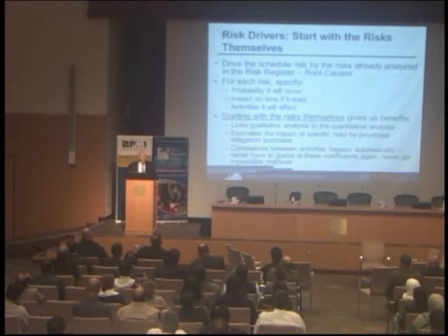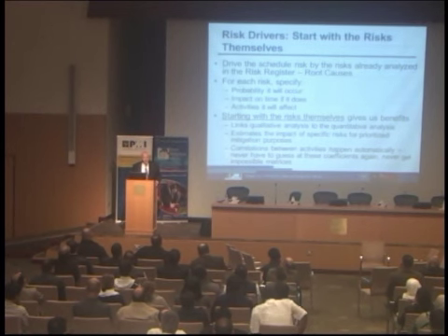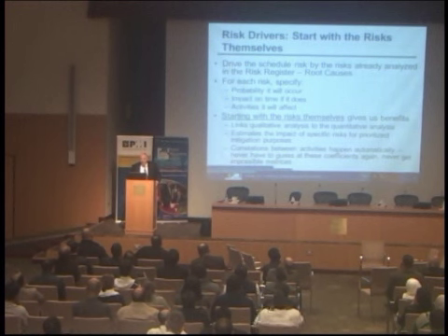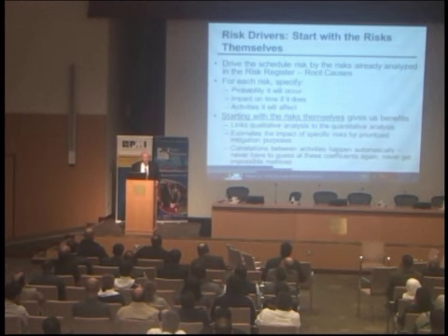In other words, we think that most likely we have overestimated labor productivity in the schedule. And most likely it's going to be 10%. The activities that it's assigned to will be 10% longer than they are in the schedule. That often happens, guys. The most likely impact may not be the number in the schedule.